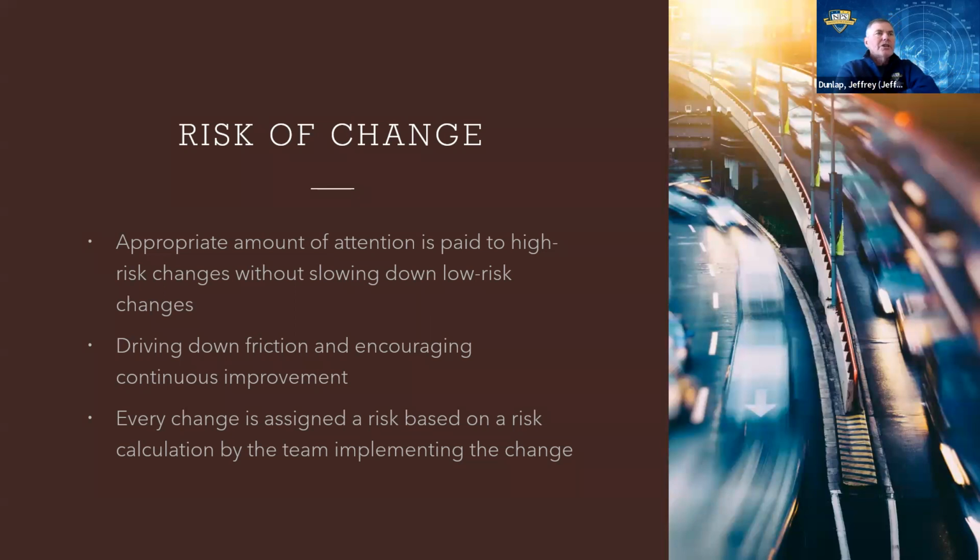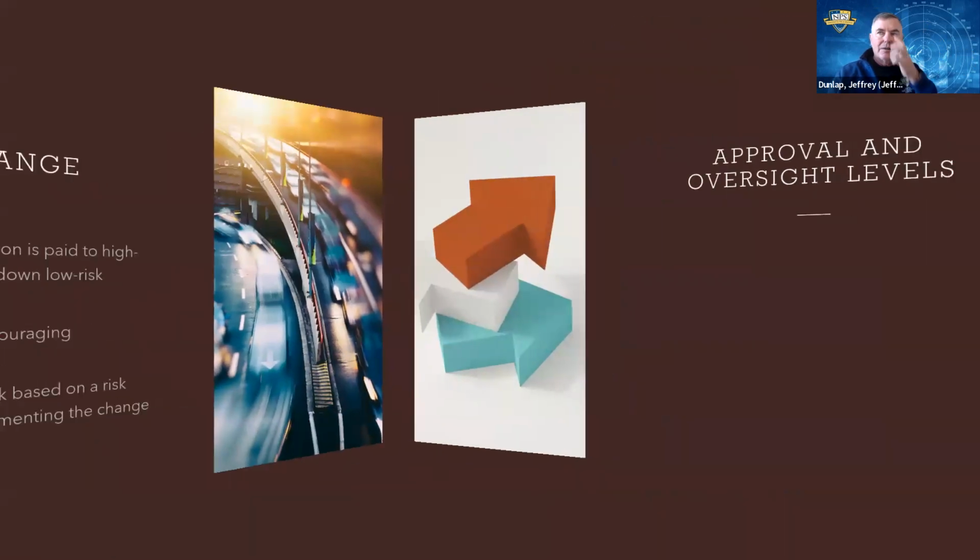Remember when we did acquisition risk management, we basically looked at likelihood and consequences, and we did some sort of assignment. We said likelihood was based on a probability that we were going to have some sort of event happen, and the consequences were based on some sort of cost, schedule, performance thing. So we could say, yeah, it's a likelihood of 3 and a consequence of 3. And that put us right in that yellow area when we did acquisition risk management. Okay, that's what they're talking about, doing something like that.